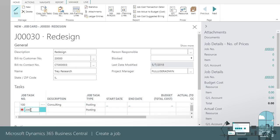We can have one or two tasks, such as consulting or design services, or a list of many tasks. We'll leave the job task type set to posting, so we can add budget information on a planning line.